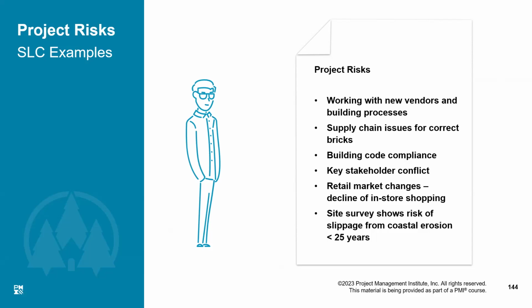We exactly know what the precondition and the cause are: there is inclement weather, there are weather reports that the weather might be bad that day. And the risk is that if it rains, what is the effect of it? The effect is we won't be able to continue our construction work that day, and the ultimate result is that we will be delayed by it.